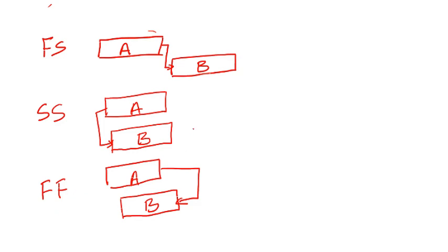Notice that usually most start to start relationships can also qualify as finish to finish relationships. Remember we talked about writing and editing. If we use the same example for finish to finish, writing has to finish before editing can finish. I mean, the editor can't say I've finished editing when the writer is still writing, for example. Or the movie example we used, don't forget that the shooting of the movie has to finish before the editing can finish. That's what we call a finish to finish relationship. But don't forget that these activities run concurrently at some point.